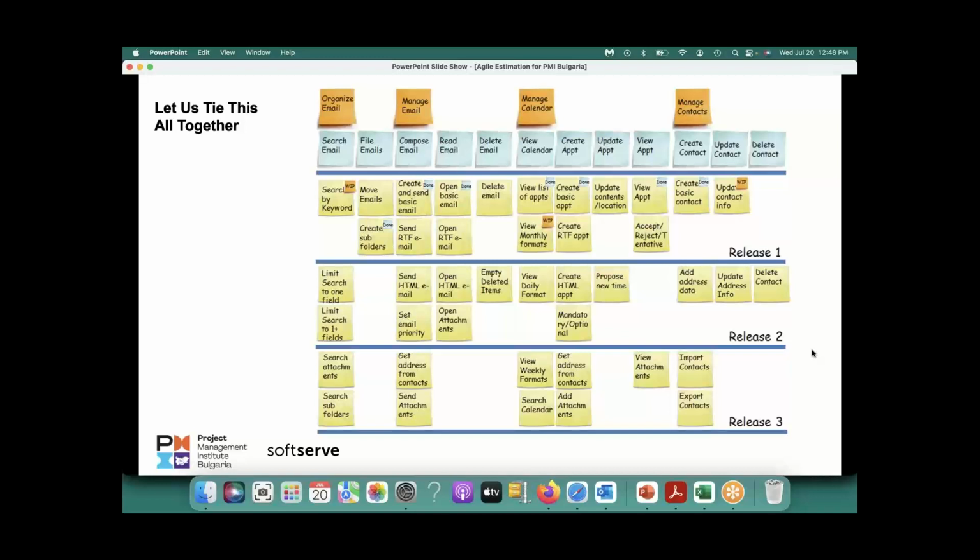The idea should be to have more in the committed goal. You may start with 50-50, for example, 50% in committed and 50% in stretch, but slowly increase the committed part to 70-80%. If you can reach 80%, that's wonderful. Start with 50, reach 80, you are great. You have done your job as an excellent project manager. And if you did that, I think you can solve this problem for your team.